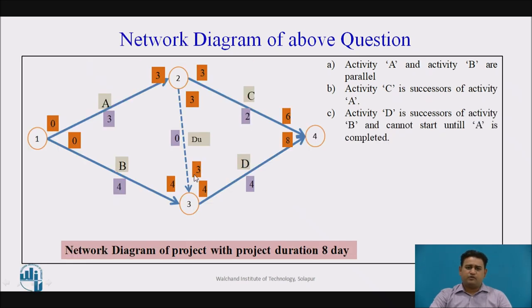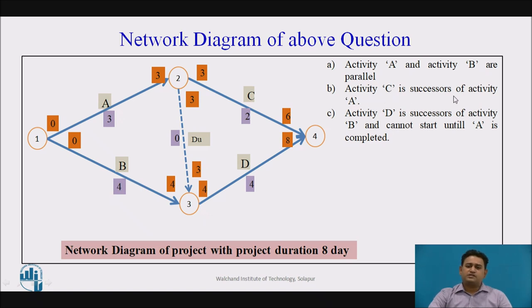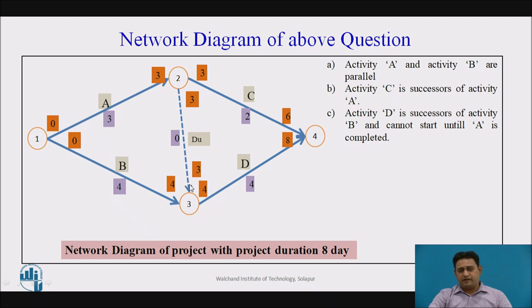Now, this is the network diagram of the particular activities. Activities A, B, C, and D are presented by arrows and their start and finish are represented by events. Activity A and activity B are the parallel activities. Activity C is the successor of activity A — after the completion of A, C starts. Activity D is the successor of activity B, but it will start only when A is also completed. To maintain this, I have used a dummy activity between events 2 and 3. This dummy activity does not consume any resource or time, but it is needed to maintain the logical integrity.